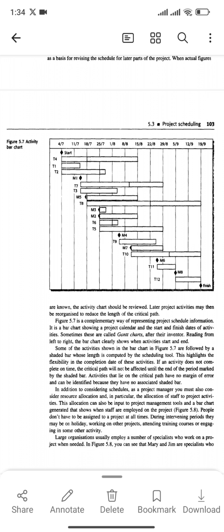Moving on, there is an activity chart, which I was talking about. Task 1, task 2 and task 4 are started on 4th of July. Milestone 1 is reached when we complete task 1, and once task 1 is completed, task 7 and task 3 can be started.